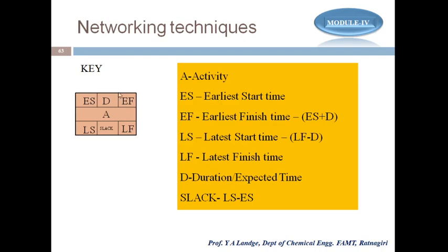Now how to calculate early finish? Early finish we can calculate with the help of the formula ES plus D. What is ES? ES is this one, plus D. D is the duration of time. So ES plus D equals the EF.